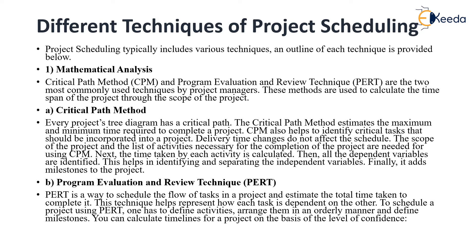Critical Path Method: every project's tree diagram has a critical path. The Critical Path Method estimates the maximum and minimum time required to complete a project. It also helps to identify the critical tasks that should be incorporated into a project. Delivery time changes do not affect the schedule. The scope of the project and the list of activities necessary for completion are needed for using the Critical Path Method.